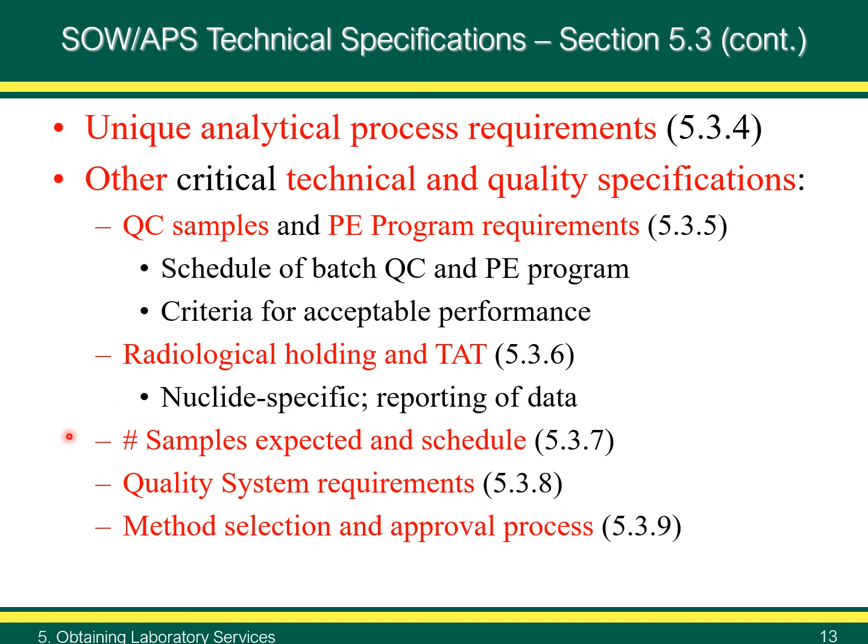Other requirements would include the number of samples expected and schedule for their receipt. This is discussed in MARLAP section 5.3.7. The SOW should state the estimated sample load by schedule, if possible.